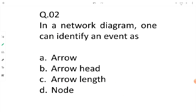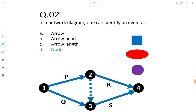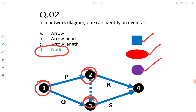Let's move to question number 2. In a network diagram, one can identify an event as an arrow, an arrowhead, an arrow length, or a node. Whenever you are provided with a network diagram, you can identify an event denoted by a node. A node can be represented by a small square, an oval shape, or a circle. Events are these nodes — node 1, node 2, node 3, and node 4. Just look for the nodal symbol which can be represented by a square, oval, or circle.